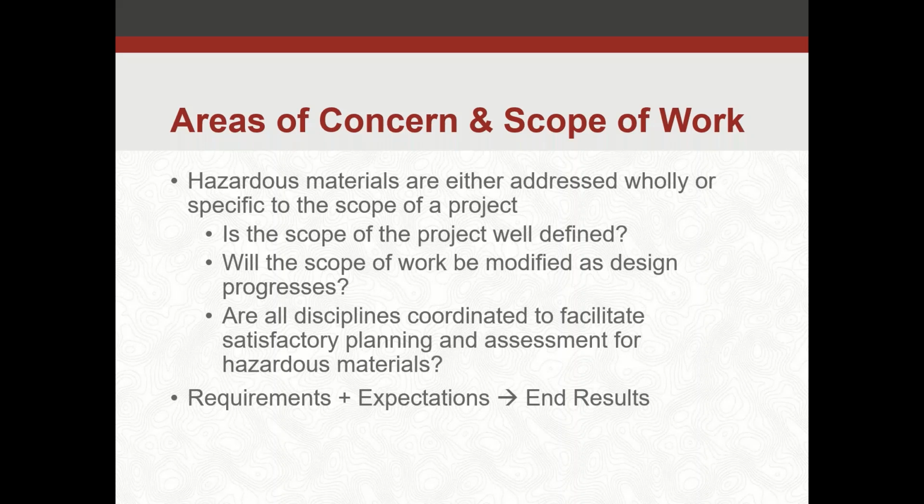And then we're going to leave some other hazardous materials in place as long as they're intact and in good, decent condition. We'll leave it there. It becomes a problem for a future renovation, but there's project funding and all that in consideration. You may not be able to remove everything right out of the get-go. You might have to manage in place for the life of the building.